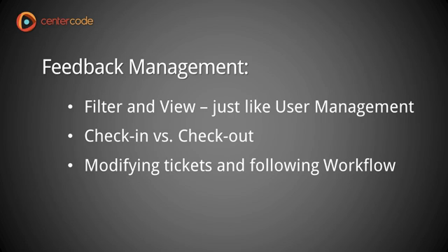Additional functionality within feedback management is the check-in versus check-out function. In the case of the Nighthawk project workflow, new tickets come in from your testers, they go directly to the general support team. Users within that team then have to check out the bug to themselves in order to modify those tickets, adjusting statuses and whatnot to take action on those bugs, and then they'll check them back into the general support team if another user needs to pick them up.